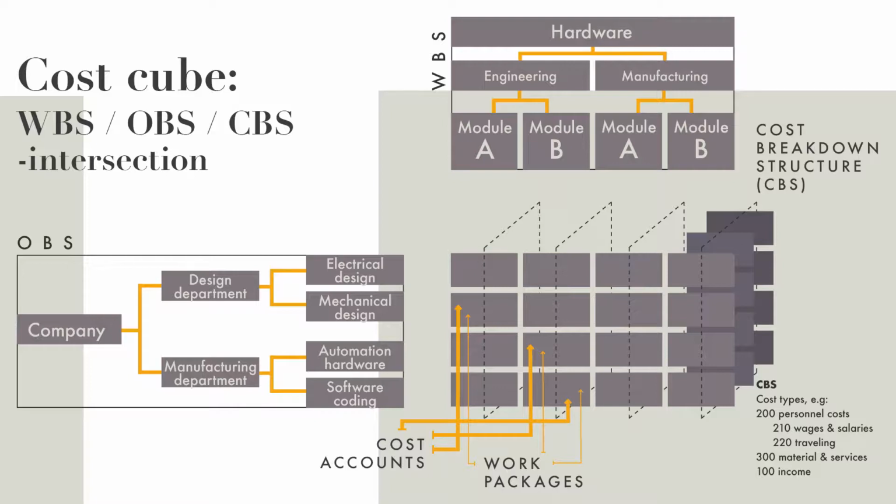It is very important now to understand that costs are recorded to these hierarchical structures, but in regard to timing, not only actual costs are recorded, but for example, estimates and budgets are recorded to these structures in the project management system much earlier than the actual costs will incur.